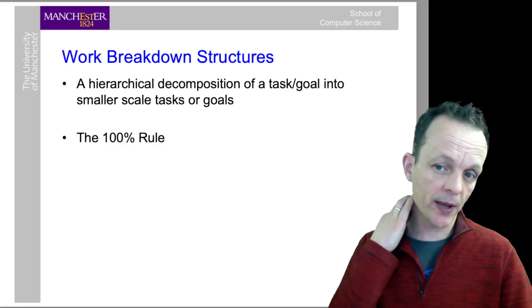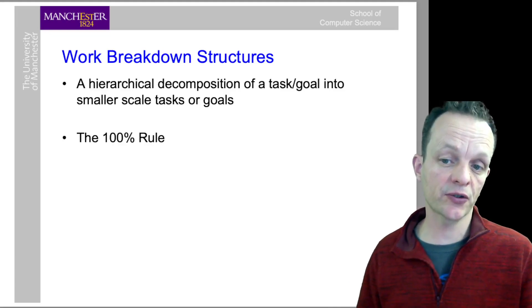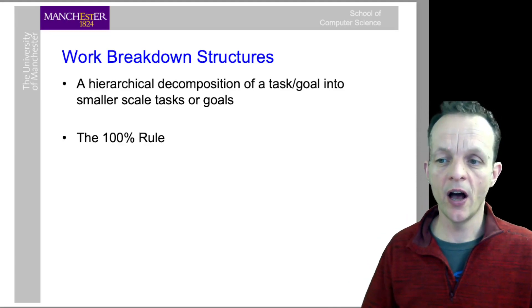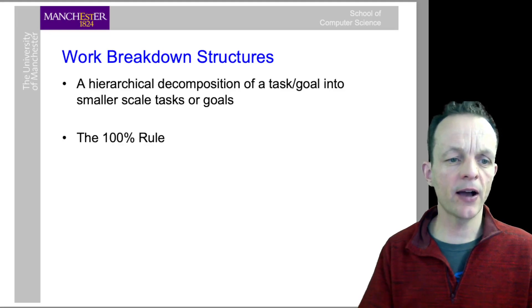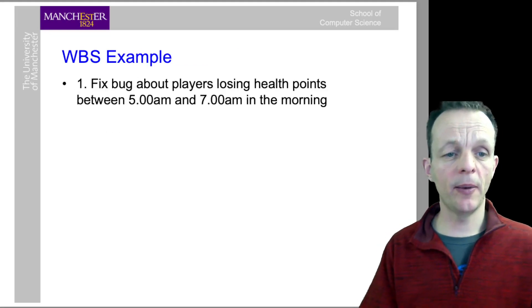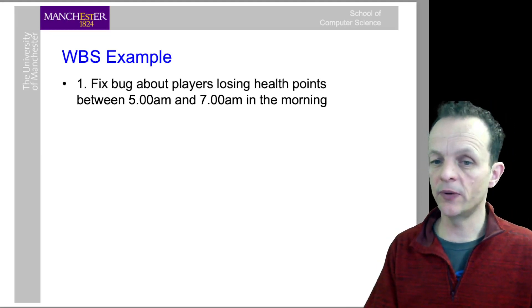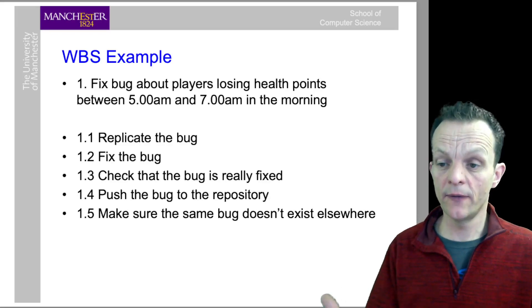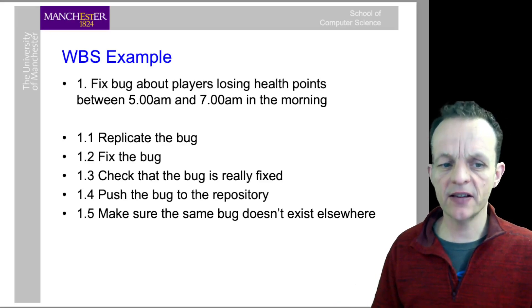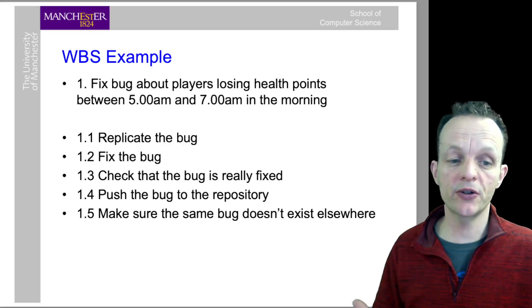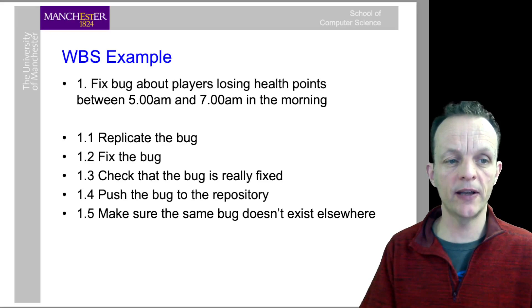A really simple way of doing this is work breakdown structures, WBS. This is a hierarchical decomposition of a task or goal into smaller scale tasks, and it relies on the hundred percent rule - your time has to add up to 100%. In the context of Stendhal, if we're fixing a bug about players losing health points between 5 a.m. and 7 a.m., we can break that down into subtasks: replicate the bug, fix the bug, check and test that it's fixed, push to the repository, and make sure the same bug doesn't exist elsewhere in the code base.